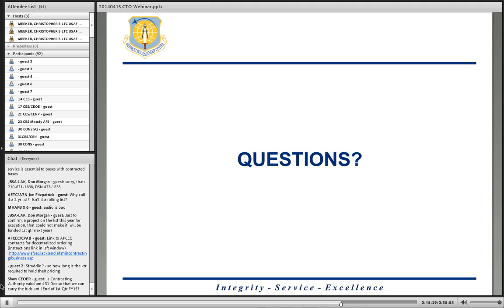From Charles Carnley: will this ATA process eliminate the need for MAJCOM facility ATAs? The answer to that is, if it's part of that list, or the centralized program, then yes, that is your authority. You have the authority you need to go execute the requirement. Now, if it's a small sustainment requirement, unfunded, that's being done through the MAJCOM, you still need to rely on them locally to provide the authority you need.